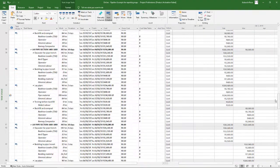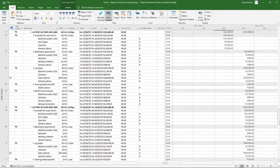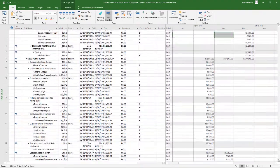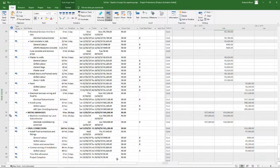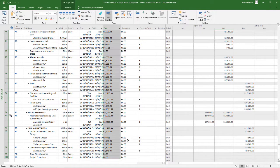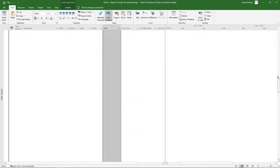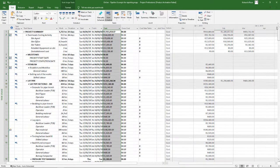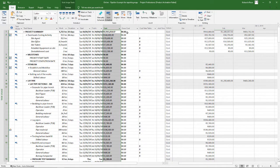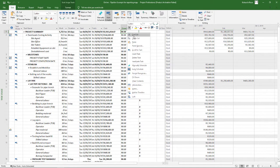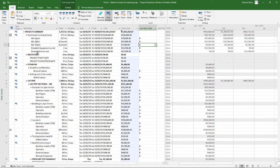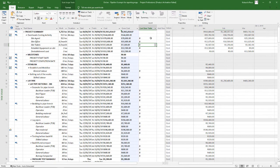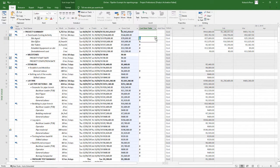Then what I'll do is I'll simply select this, all the values in this column, in this field. I'll copy them. And I'll paste them in my created field over here. And then I'll simply change my cost rate table back to A now.